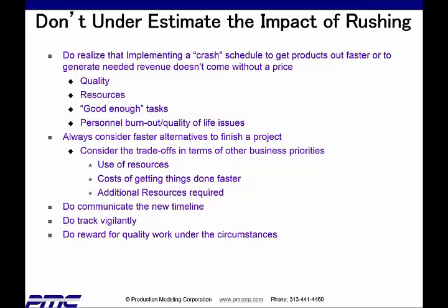Don't underestimate the impact of rushing something. Do realize that implementing a crash schedule to get products out faster or to generate needed revenue doesn't come without a price. The price might be quality, it could be resources, it could even just be good enough tasks. Oftentimes, it's personal burnout and quality of life issues. Once you start causing those, you're going to start losing people.